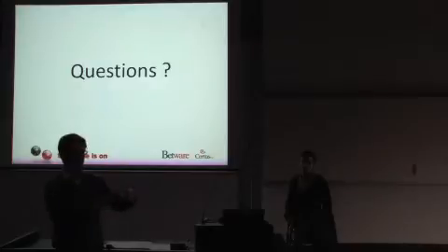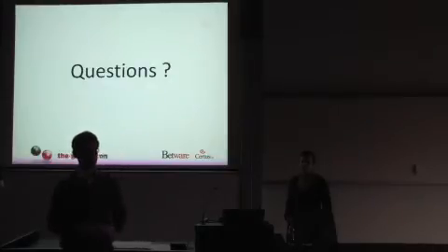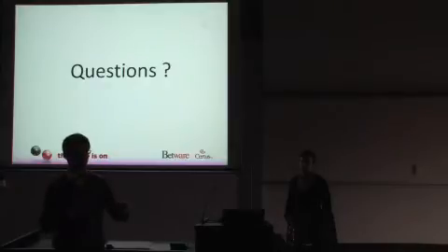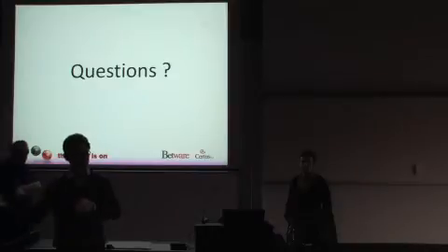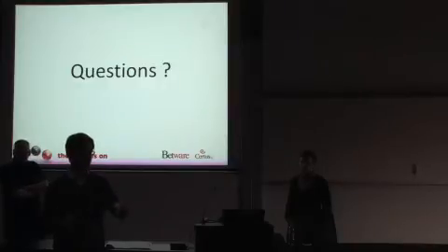So we have pre-planning meetings. We have meetings where part of the team is meeting with the product owner and the stakeholders, and discussing with them: okay, next iteration, we want to take one step. What is it within the next iteration that you want us to do? So when we go into the planning meeting, we actually have everything pretty much spec'd out. We know exactly what we're going to do. It's only these things here. Everything else will be left for upcoming iterations. So this is how we can accurately estimate and commit to the stories.